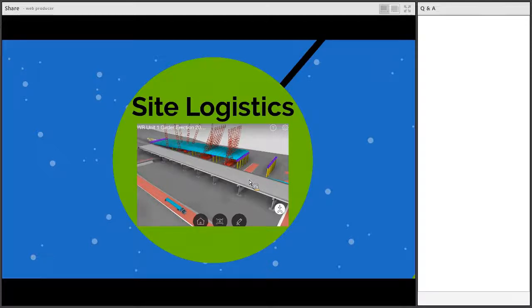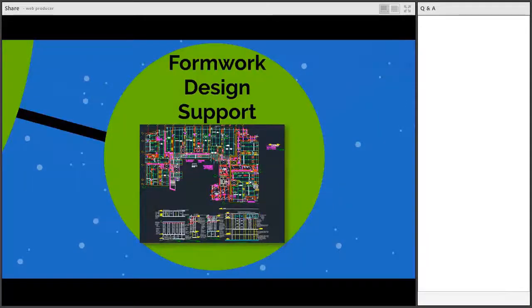We use this because I had some young guys, quite frankly, who were darn good at building BIM models, and then I had a group of older guys with gray hair and AARP cards that weren't really super interested in this new BIM thing, but they liked being able to see the sections that the model would generate. So one team would be generating the model three-dimensionally and hand it off to the team that never got out of 2D, but that would help them with the shoring stack, which is pretty critical. You don't want to have a 5-foot frame when only a 4-foot will work, or vice versa.